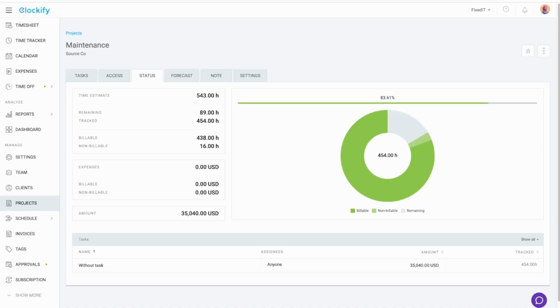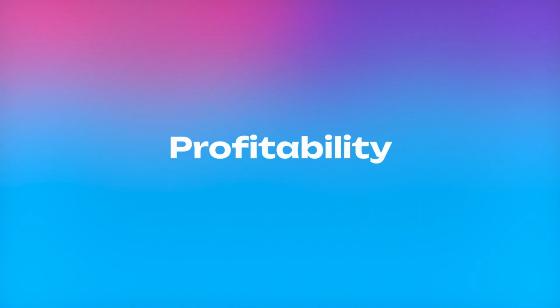But if you take on similar projects from the same client, most of your team's time will be dedicated to billable tasks. This results in a higher utilization rate. Now, an ideal utilization rate will vary from project to project, but it should always ensure your agency stays profitable. Keep in mind that a 100% utilization rate is not feasible or desirable, but an uptick will result in increased profitability. If you know which team or team member generates which amount of costs and profit, you can better allocate resources.